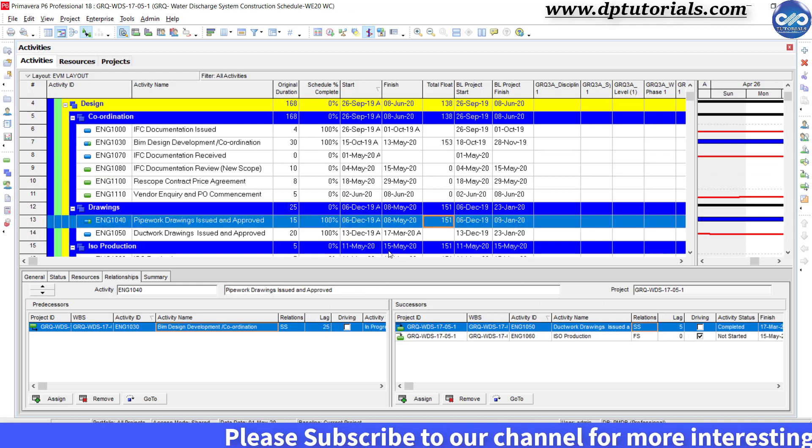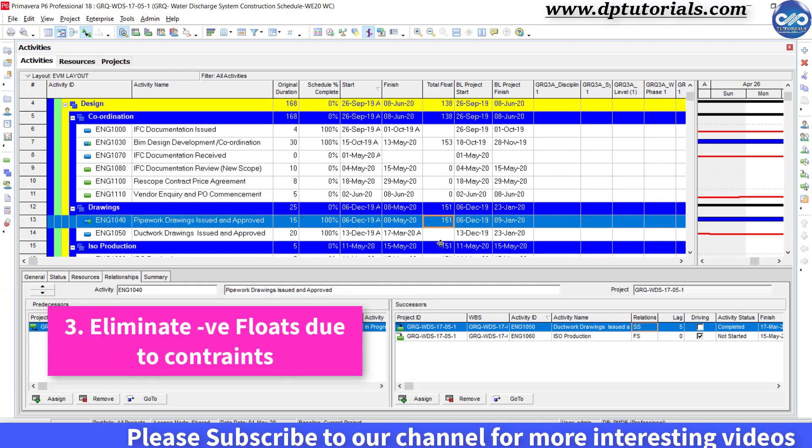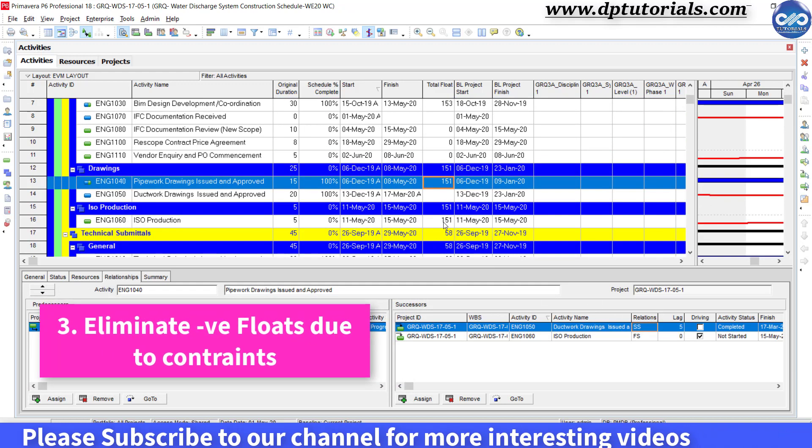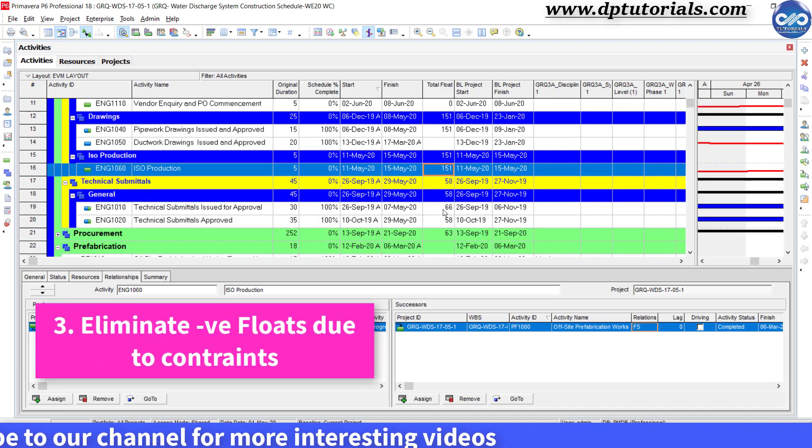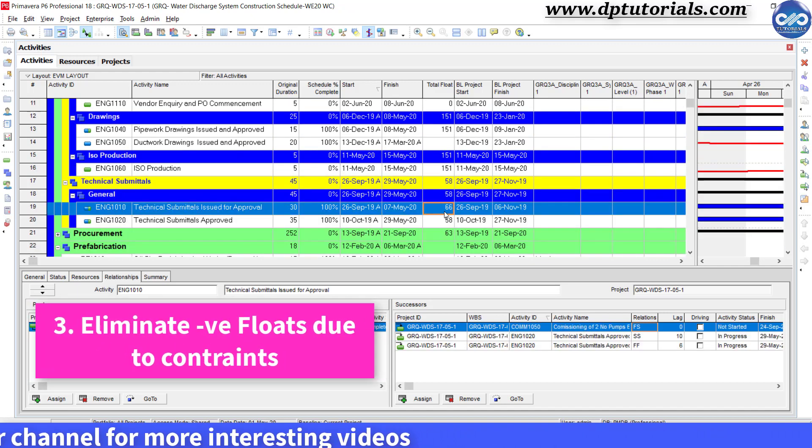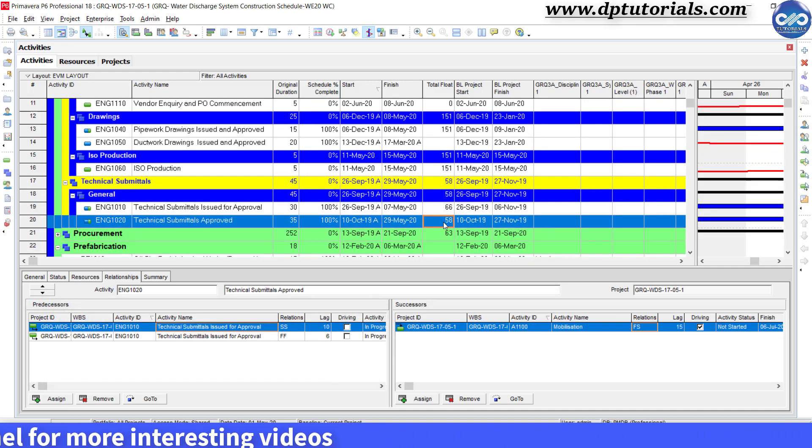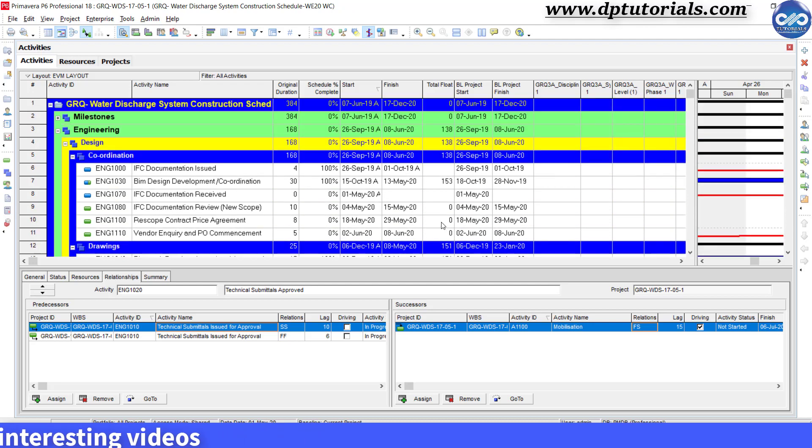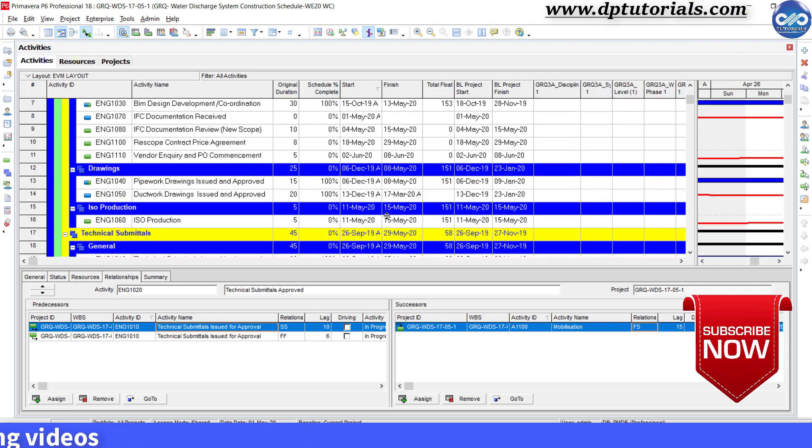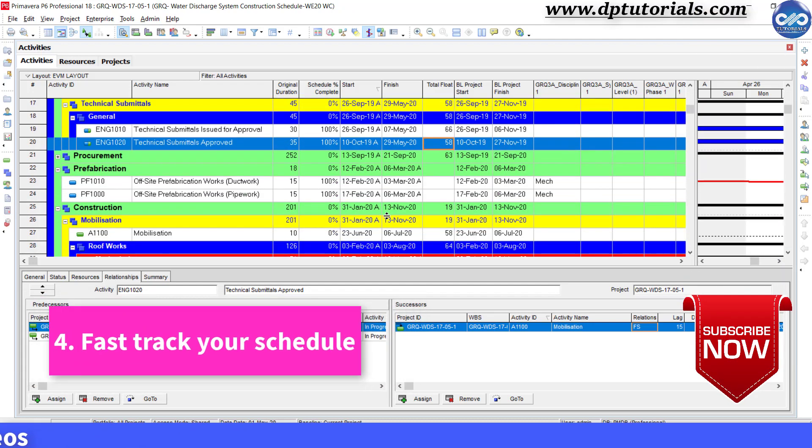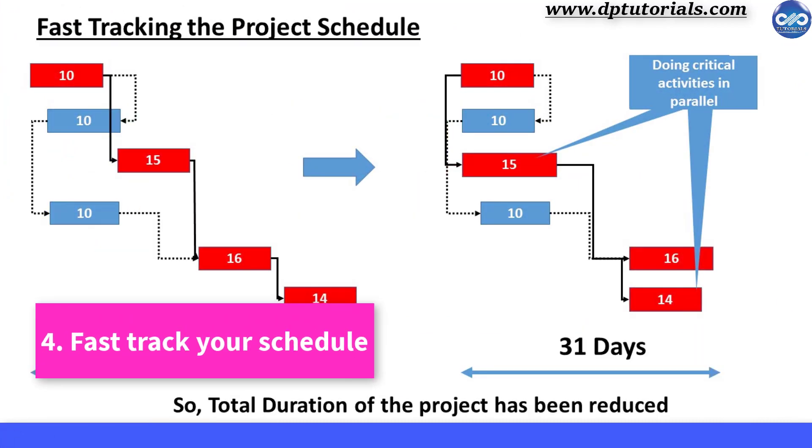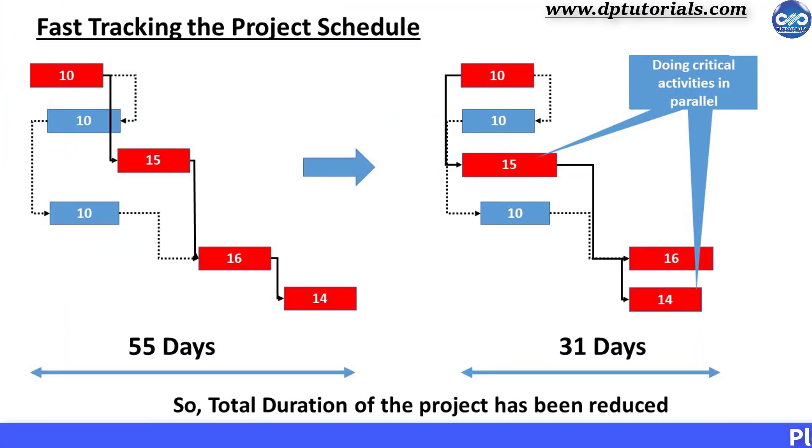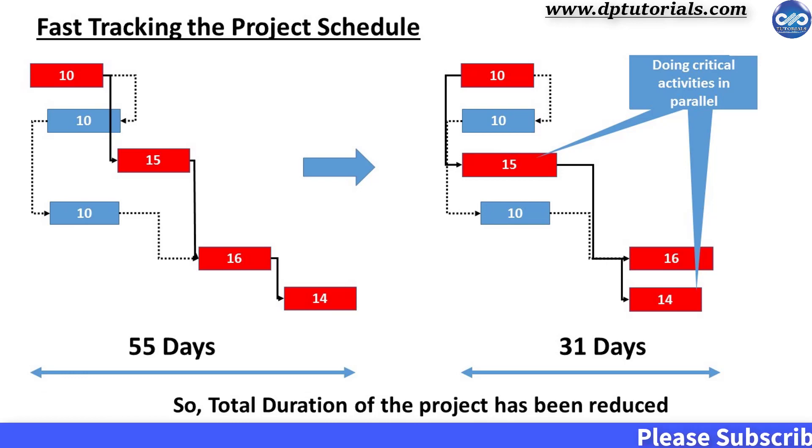The next one is eliminate negative float which arrive because of the constraints that you put in your schedule. So avoid constraints in your schedule. And the fourth one is fast track your schedule so that most of your activities will run in parallel and thereby you can reduce the high floats, but make sure that you are not creating conflicts between activities.